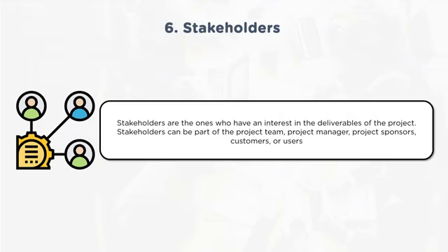Now every stakeholder will have a specific interest, a power, an ability to influence. Through their position, through their distance from the project, they will get impacted. At the same time, they will also impact the project. Similarly, they influence and they get influenced because of the project. So a project manager should identify all the stakeholders and understand this. What kind of stakeholder is this in terms of power, legitimacy, influence, and impact? After understanding that, there should be a strategy for handling the stakeholders. How am I going to engage with these stakeholders? It is very important.